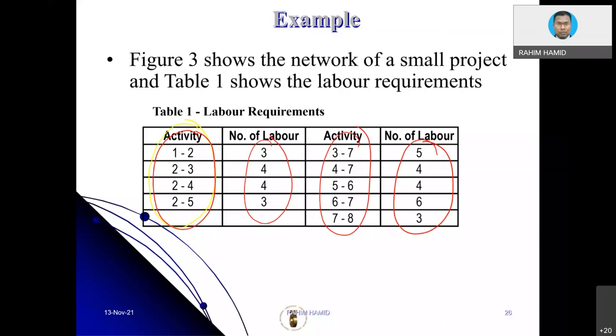Okay, first things first, let's say you are getting some information. So activity duration is given, and activity listing is given. Duration should be given as well, which is not shown here. And then the laborer, the resource requirement, is shown. So that is the three pieces of information. For activities one and two, there is no need for a predecessor, because once we use an A diagram, one and two means that you are going to connect node number one to node number two, and automatically you will know those activities. So the activity naming is basically activity 1, 2. That is the name. Then what shall you do? You need to draw the network diagram.